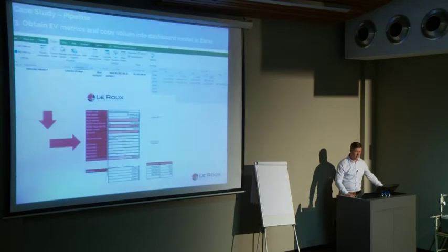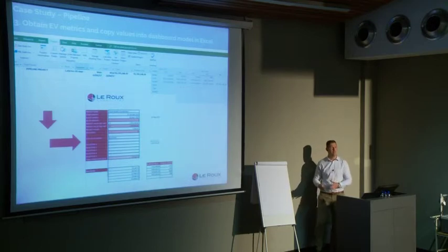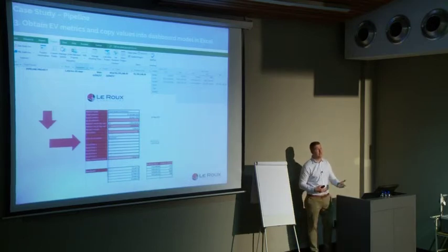Secondly, I just go and I assign them to my activities. So even though I've got slightly more activities, it's a simple exercise of saying, what do I need to excavate here? TLB, 2 laborers. What do I need to lay the pipe? Well, I need the pipe material. I need 2 laborers as well, plus the TLB. So each and every activity, I just look at it, I assign the resources.